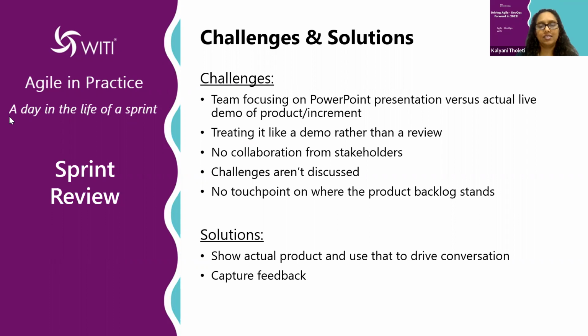In regards to the sprint review slash demo, what I've seen work well when working with multiple teams is looking at it even as you start your sprint. When you're doing sprint planning, you already know what features and stories are related to whatever feature we're working on. You already know the stakeholders involved. So once you complete sprint planning, you should invite key stakeholders to attend, so they have more time to schedule it in.